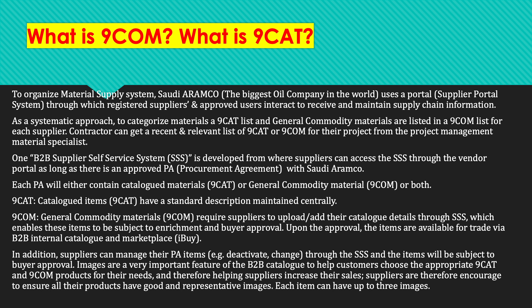What is 9COM and what is 9CAT? To organize the material supply system, Saudi Aramco uses a supplier portal through which registered suppliers and approved users interact to receive and maintain supply chain information. As a systematic approach, categorized materials are listed in a 9CAT list and general commodity materials are listed in a 9COM list. Each supplier or contractor can get a recent and relevant list of 9CAT and 9COM for their project from the project management material specialist.